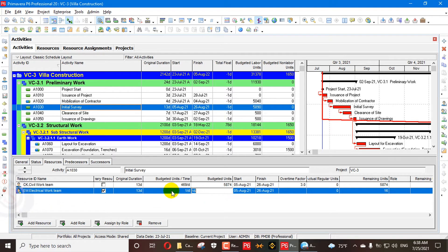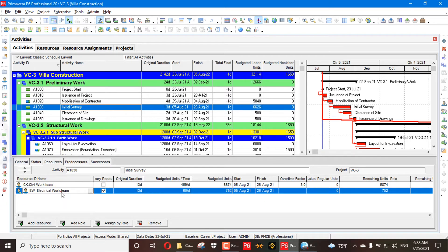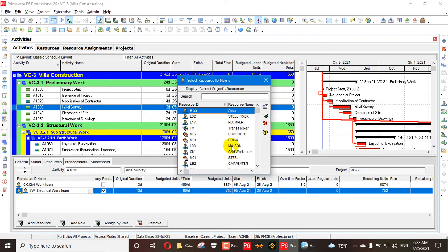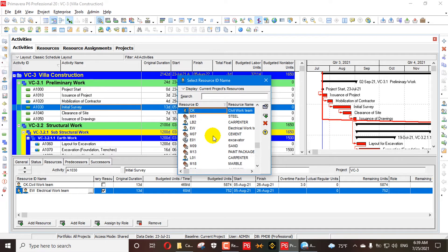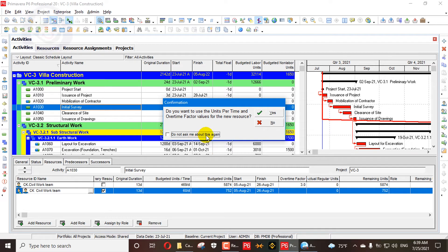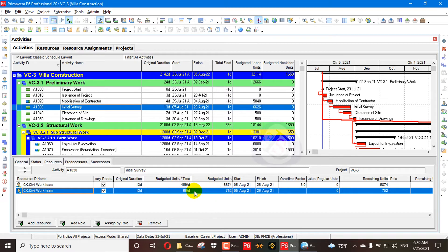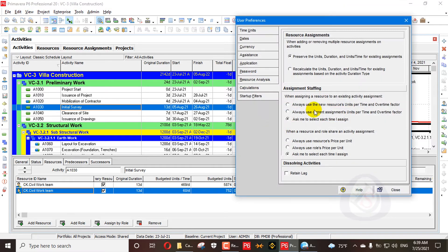We say the budget units per time is 60 and we want to change it to Civil Work Team. This time I say I don't want to change the new units — the units per time will remain the same as the replaced resource. When we say no, the units per time stays the same.